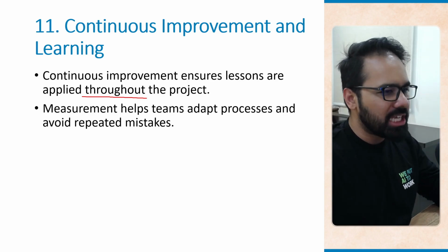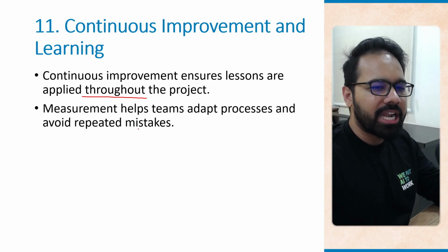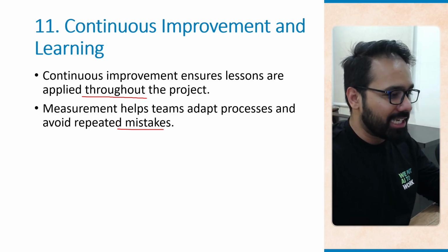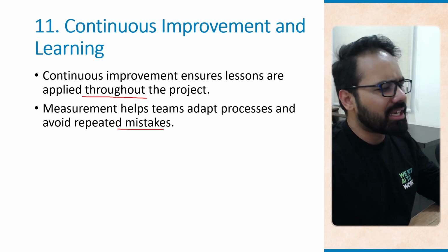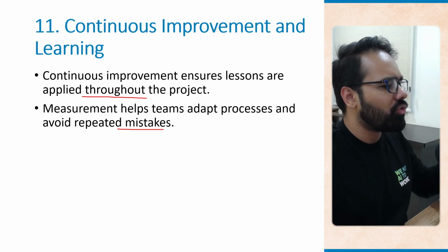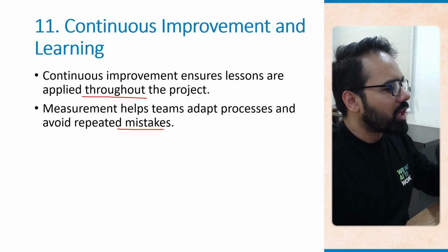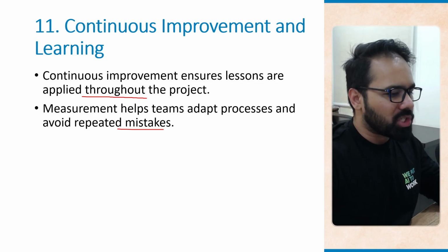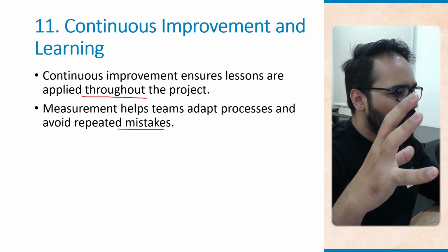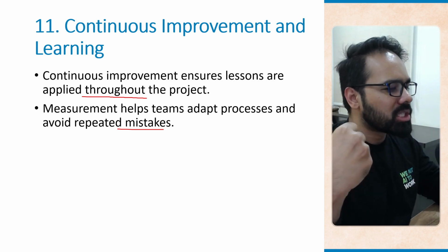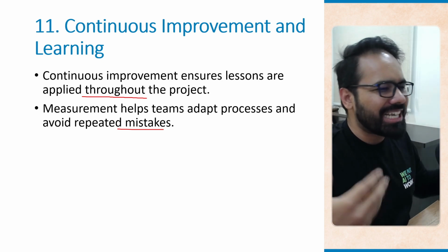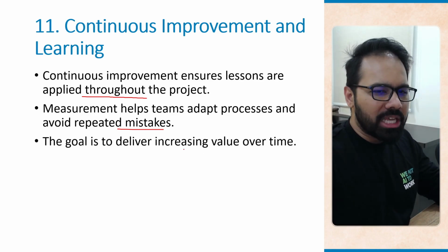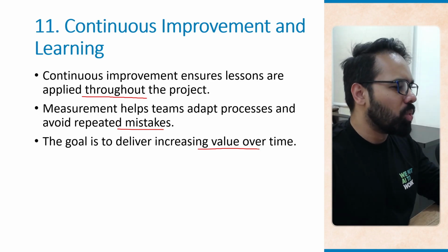Measurement helps teams adapt processes and avoid repeated mistakes. For example, if testing consistently reveals that there are issues in your checkout flow, the team can improve requirements gathering or maybe design reviews to prevent similar problems, right? So the team can focus more on this checkout flow because the team knows that consistently there are issues being reported in this flow. The goal is to deliver increasing value over time.